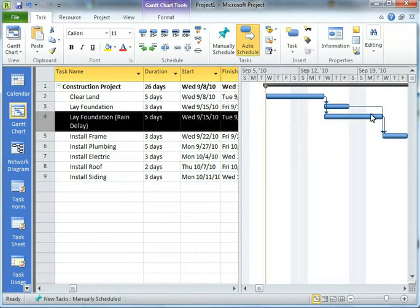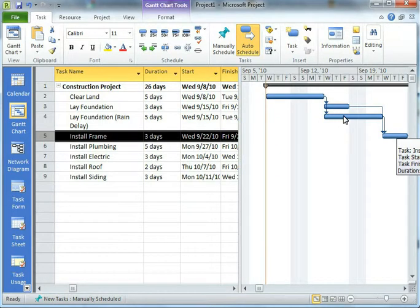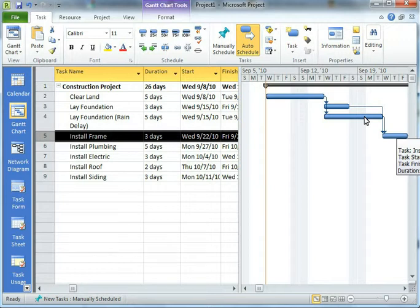Either way, I can't install the frame of the house until that foundation is dry. And so I see that here, both the activities are listed and we've got this delay in between. The problem is these are going to show up as actual activities. If I have costs associated with them, when I run my report, I'll now see double the cost.